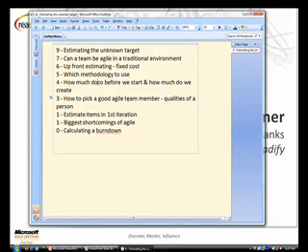Alright, so in a nutshell, have a crack at doing it and spend a little time to try and get a feel for it first and go from there. And in terms of a backlog, keep nebulous items fairly nebulous. Don't try and break down items into smaller subtasks that might help you get a better idea of it. If it's a long way in the future, just let it come when it comes. Estimate and deal with what's current and worry about the rest, if that makes sense.